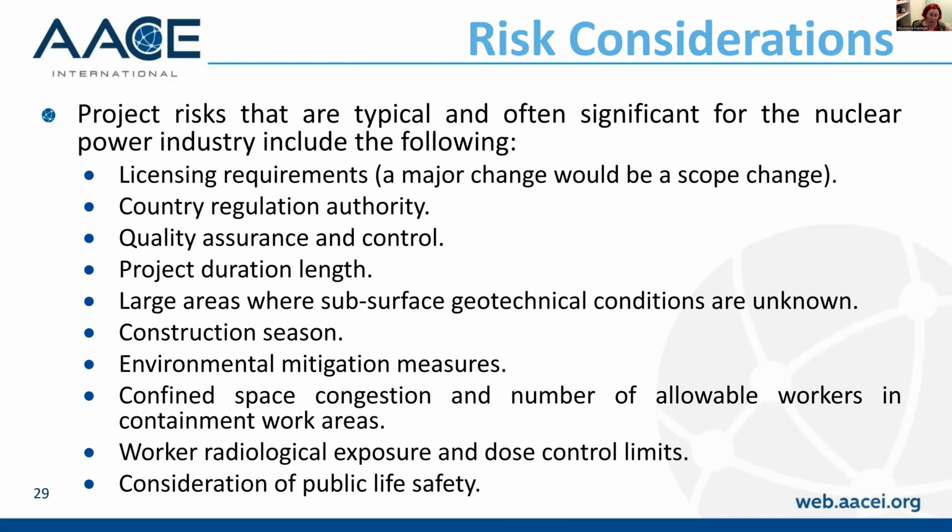Because what we really want to do is remove the uncertainty, right? Make things more accurate. If we can make things accurate, we know that we're going to have our return on investment and meet the strategic objectives of the organization, which is the whole point of doing projects in the first place, not just to keep us employed. And in the case of minor projects or minor modifications, repetitive, as I said, accuracies may fall well within the bounding cases of 185R-97. In those cases, it might be perfectly appropriate.